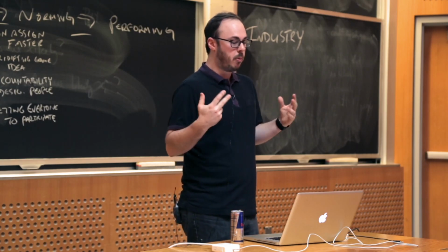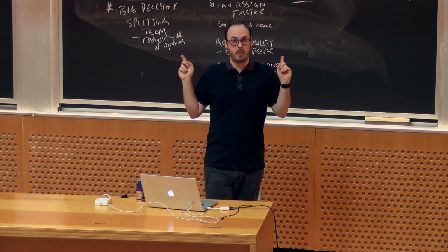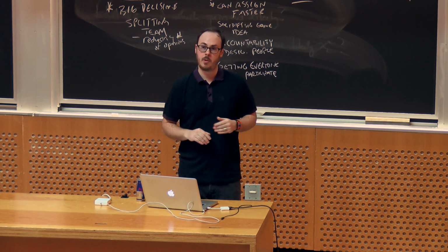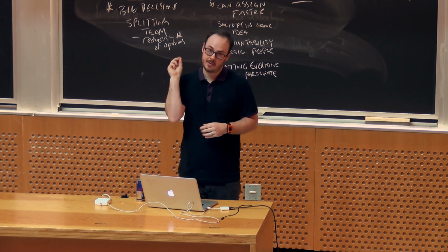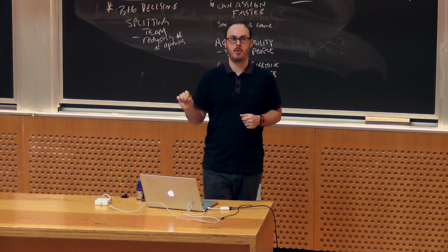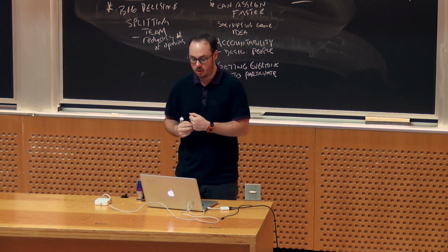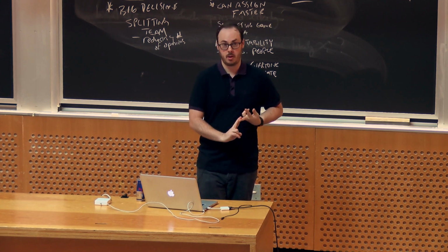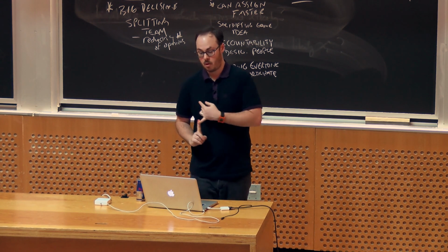But the way they're able to do that is they've got these frequent team interactions. And actually, when they're working for a long period of time, there are people who are working on their own in their home or their home office with another team that's very far away. And yet, these teams still do a daily stand-up. Does anybody here do a daily stand-up on their teams right now? So what they're doing is they're going on video, they're talking to each other for a very short period of time about what they've done, what they're going to do, what's in their way.